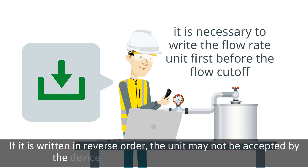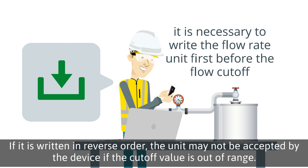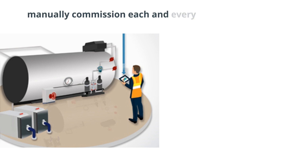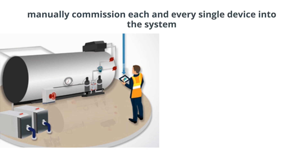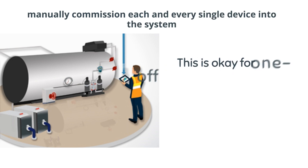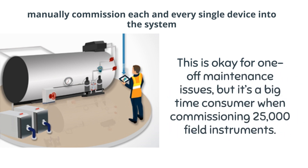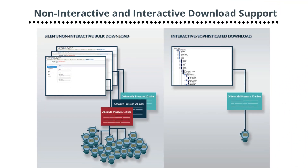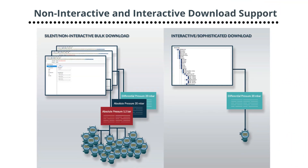Once configured and connected, previously a user would need to manually commission each and every single device into the system. This is okay for one-off maintenance issues, but it's a big time consumer when commissioning 25,000 field instruments. Enter non-interactive download. Non-interactive download standardizes the download process to support silent bulk download that requires no user interaction, potentially saving days or weeks plus man-hours in the commissioning process.